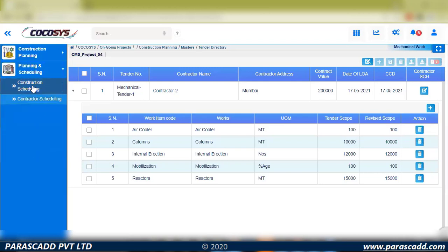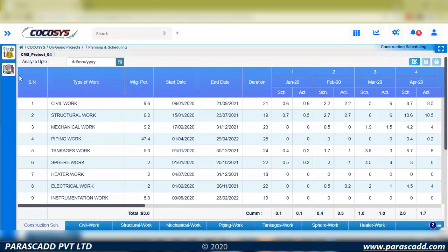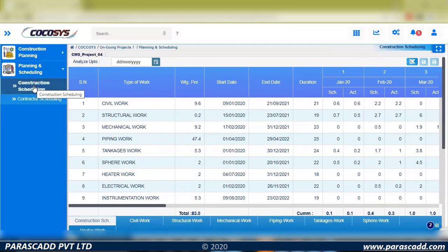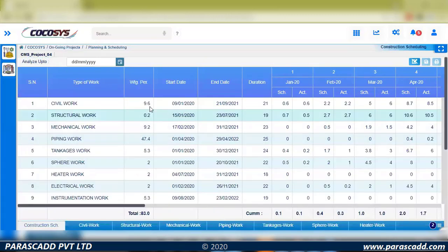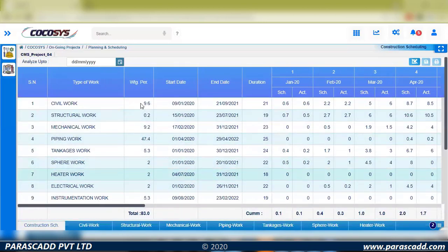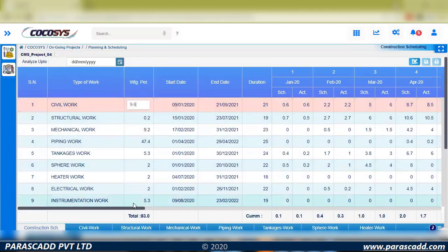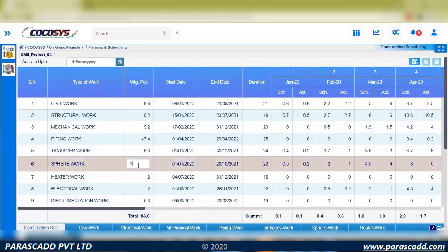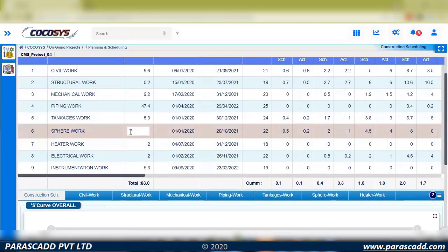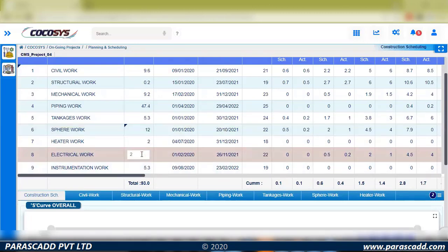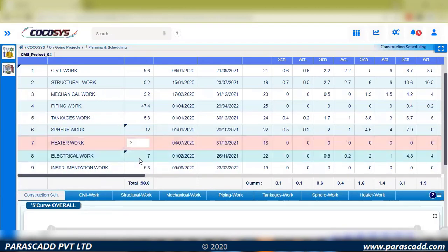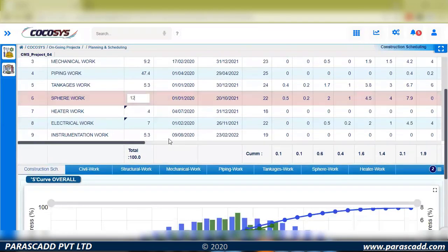Now we go to construction scheduling. There are feature rights — access rights to construction scheduling can be given to specific users, with contractor-specific or tender-specific rights enabled for individual contractors. Under construction work, I have civil-related, structural-related, mechanical, piping, and all these weightages can be manually edited with administrator rights. Currently I have 83%, meaning I haven't completed my schedule setup, so I'll edit it to make the percentage 100.